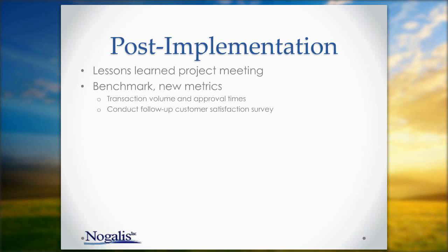And then benchmark progress after the implementation. Report on transaction volume and approval times. Conduct a follow-up customer satisfaction webinar. Finally, in the post-implementation of a previous project, consider those lessons learned at the start of your requisition approval process. That's always a good start, is to start with lessons learned.